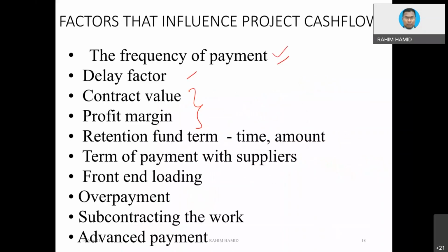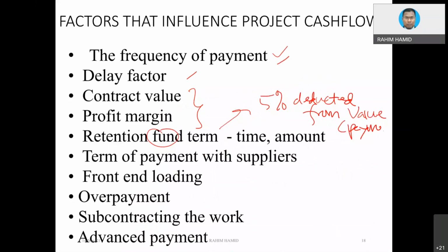And then retention fund, which could be around 5%. 5% will be deducted from the value or payment received.